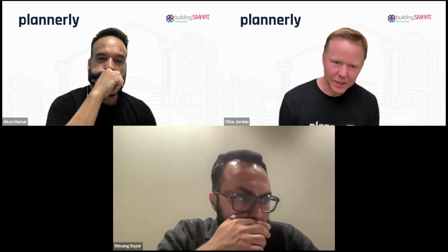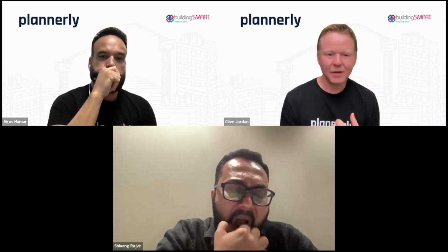So an owner wouldn't be creating the BIM execution plan. They would be asking, prior to the contract, from your capacity and capability, how are you going to deliver on my project? They would then select and then go to a contract, go to an actual BIM execution plan with the nuts and bolts to actually say, these are the processes, this is how we're going to deliver for you on your project. My off the record personal opinion is that there are far too many BIM execution plans that are being copied and pasted and bandied about and not actually getting to a true agreement.